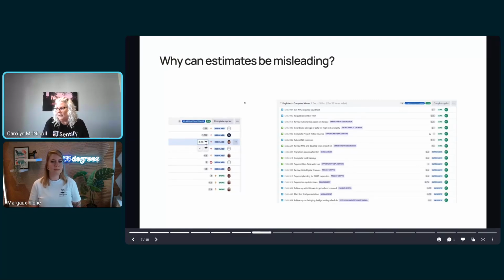So if they're working with numbers that make sense to them, that might be okay. But still, we go back to the question of, did it help you get the work done when you thought it should be or could be, or did it not? And then how do you tell your customer when it will be done? Because you can't say, well, that one's a 3.28 story, so it'll probably be done in 3 weeks. Those numbers mean nothing to anybody outside the team. So if you use that as your one and only way of forecasting, evidence shows that you'll be wrong most of the time. Exactly.